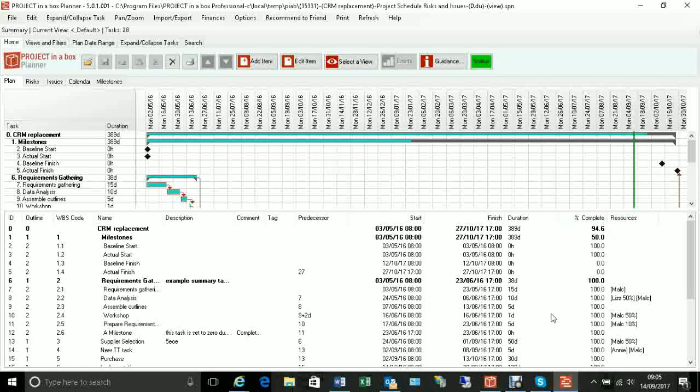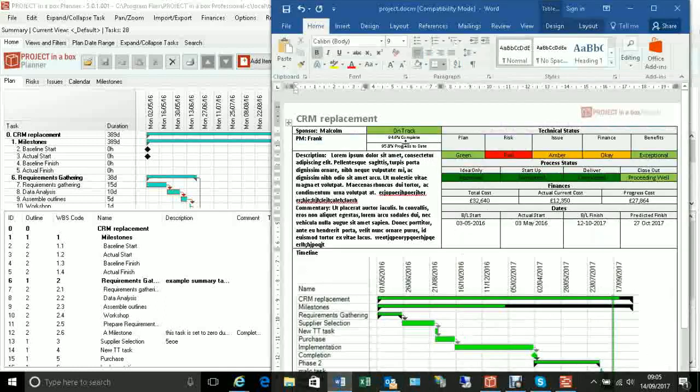So there are those two different figures, and in fact they both appear here: a percentage complete and percentage progress to date. Both are showing in this space because to really understand where you are with the plan you need to understand both of those things. How far through the overall plan are we, and is everything to be done by today done by today?